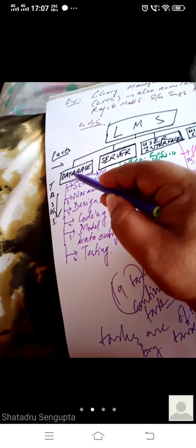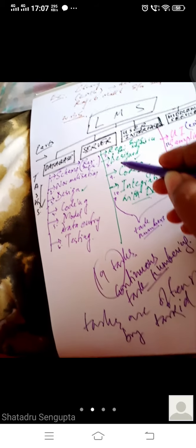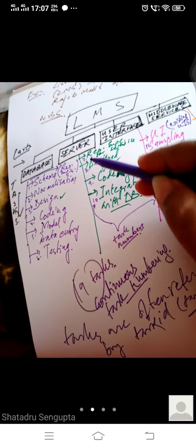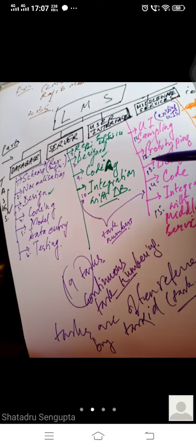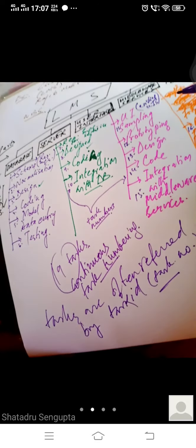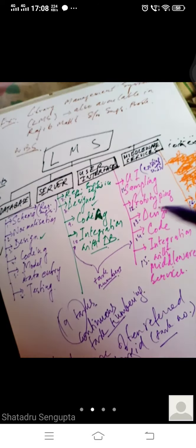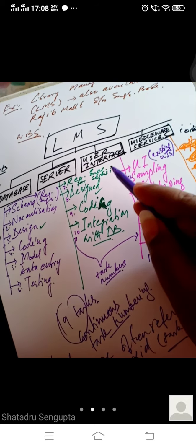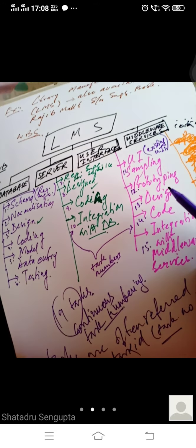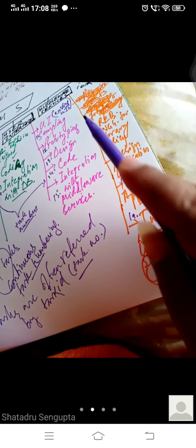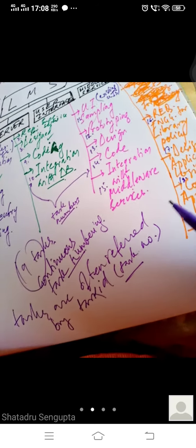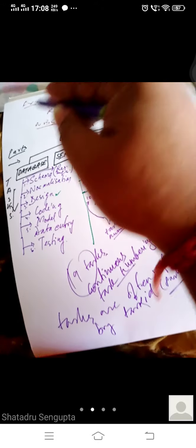Generally, that is exactly why in a WBS you don't do 1, 2, 3, 4, 5, 6, 7, 8, 1, 2, 3, 4, not like that. You do continuous numbering 1, 2, 3, up to 15, like this, so that in one WBS it is easy to understand. Say task number 13, you immediately know that's a user interface design. You say task number 19, you immediately know that's under middleware services, it's integration with UI and servers and DB. It is the unique ID for each task in one WBS particularly.